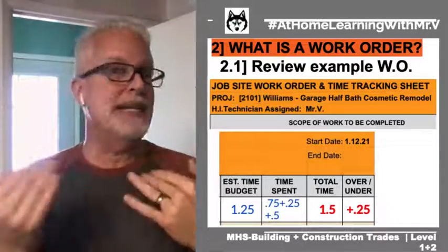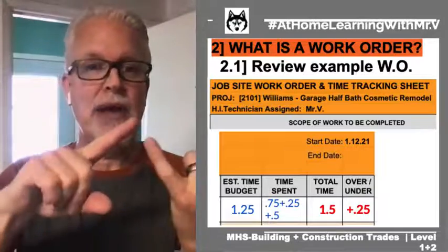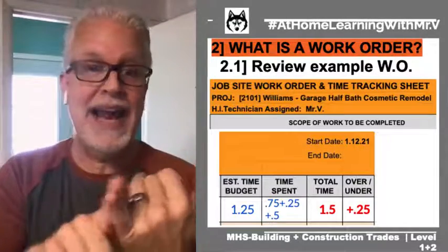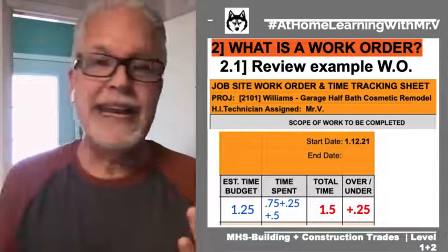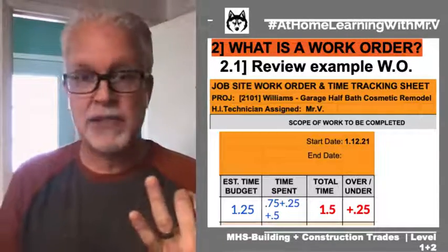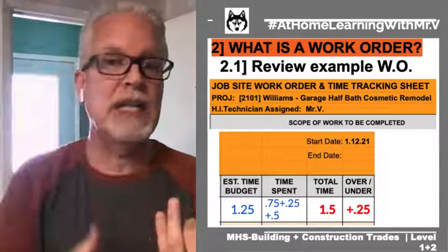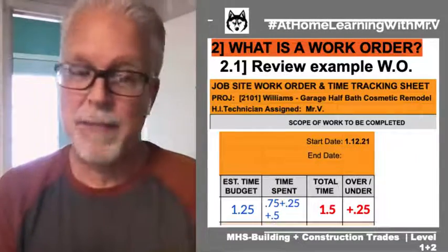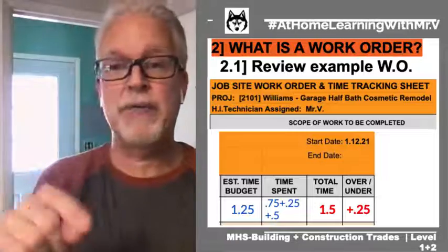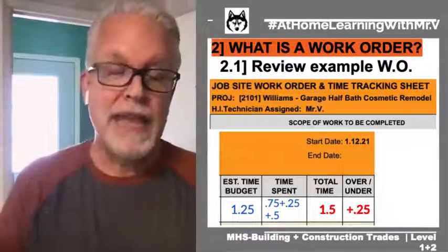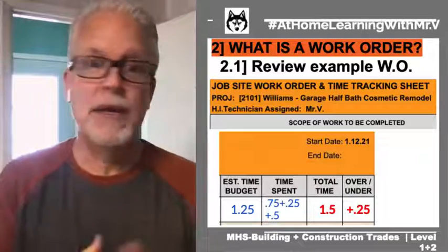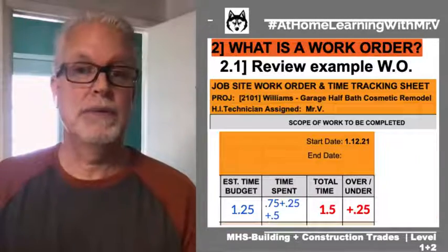So what happens to me as the owner is I either have to A, go back to the client and ask them for more money with a change order, or B, just eat it. In other words, I'm going to take a loss on the profitability of this project because I don't want to upset my client, but I am going to go back and retrain the technician to let me know if they are over budget on the time sometime in the first day or so, right?